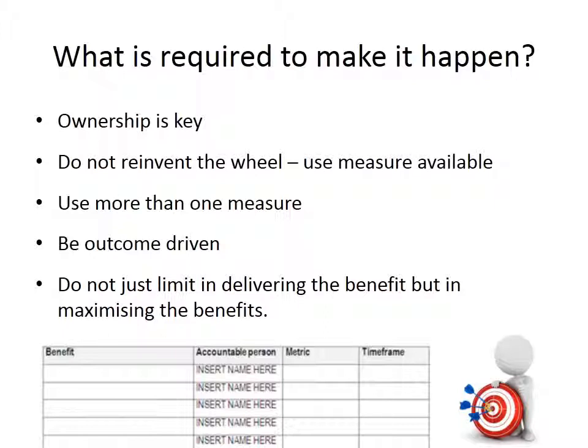on the right path. So yes, you need to define the benefit, define the owner, define the metrics, the target obviously with the metric, when this benefit will be achieved, and obviously the data source and a lot of additional information that you can add. So again, this is just an example to get you started and practically make it happen in your business case.